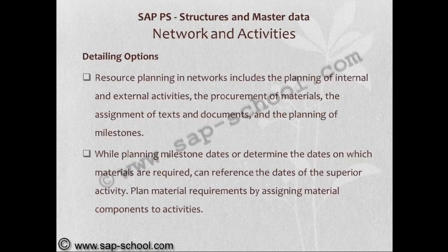Resource planning in networks includes the planning of internal and external activities, the procurement of materials, the assignment of text and documents, and the planning of milestones. While planning milestone dates or determining the dates on which materials are required, we can reference the dates of the superior activity. Plan material requirements by assigning material components to activities.